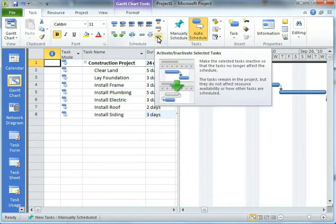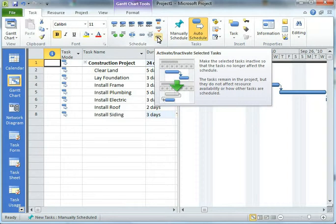This is a feature that was introduced in Project 2010, and it's actually a pretty neat tool that allows us to basically hide a task and make it no longer affect our project as a whole, but not delete it outright, not just completely get it out of the project.